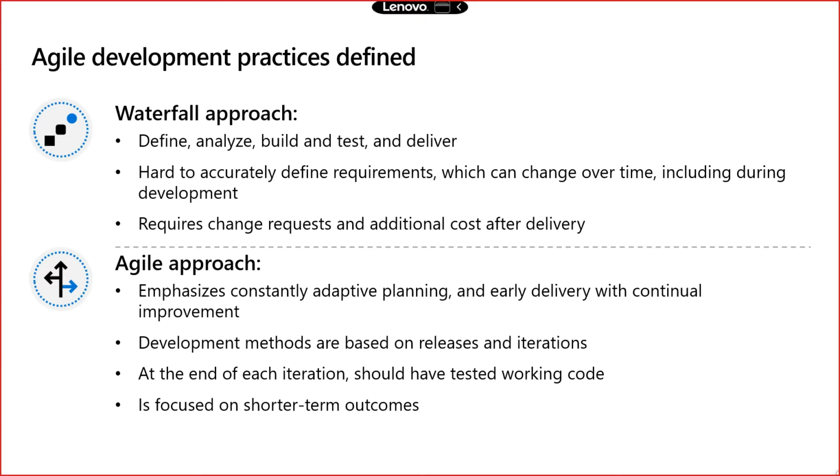What happens in the waterfall model is you take a requirement, you define the requirement, you analyze it, and you develop, build, test, and deliver those products to the client. In the waterfall model, there is no space for taking new changes into the system. Once I start development, if the client asks for a small change, I will not be able to take those changes in between the development. So there is no space for delta changes in the waterfall model.